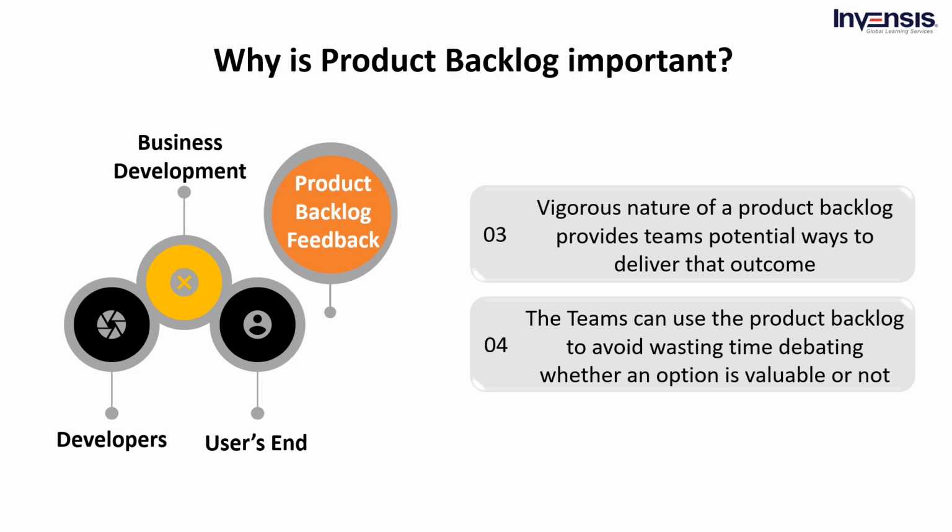In addition, when a team starts work, the product backlog does not need to be complete, so the team can start with all the initial ideas and add new product backlog items as they learn more. A team can remove items that they discover do not contribute to achieving the desired outcome. They avoid producing extraneous outputs that do not add value and spend their time working on truly valuable changes.